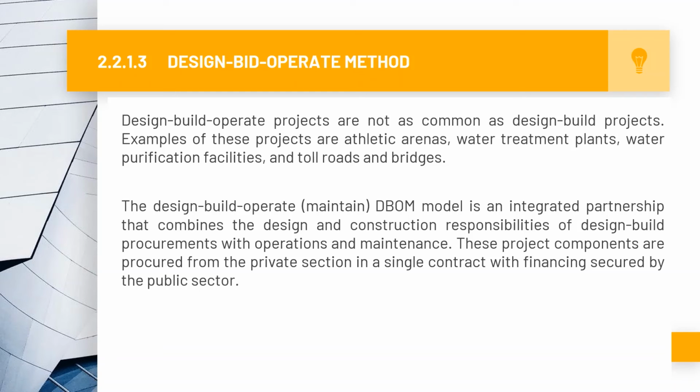The Design, Build, Operate, Maintain (DBOM) model is an integrated partnership that combines the design and construction responsibilities of design build procurements with operations and maintenance. These project components are procured from the private sector in a single contract with financing secured by the public sector.